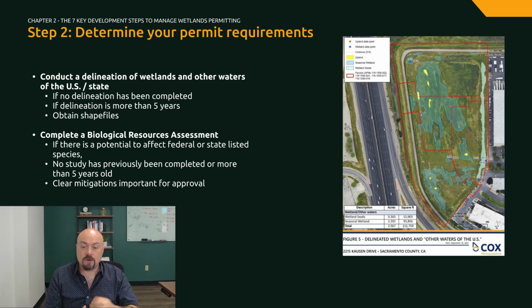These requirements most often come up on undeveloped land rather than properties that have previously been improved. A wetland delineation is a survey conducted according to U.S. Army protocol that defines where the edges of any wetlands or other waters are on your property. Wetland delineation reports are typically accepted for permitting within 5 years of the survey. You will also want to complete a biological study to determine if there is any habitat for threatened or endangered species, as they are often associated with wetted areas.